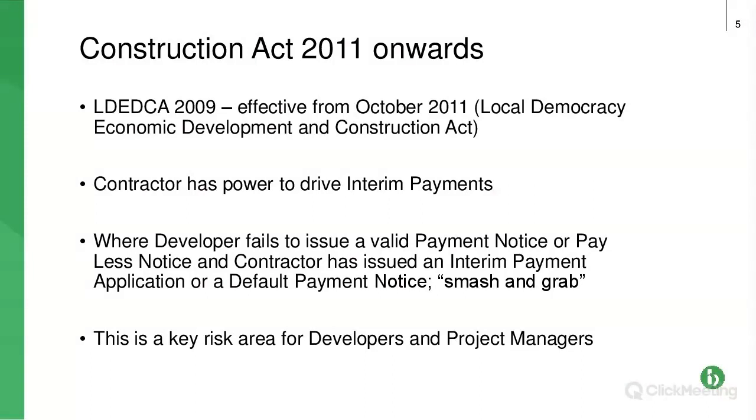We'd had adjudication, we'd had interim payments, all those things that we know about from the Construction Act for over 10 years. And as often happens, the legislation was reviewed and changes were made. A big change that was made was the status of payment notices, pay less notices, etc., which meant that a smash and grab adjudication was possible. Now, from your perspective, contractors, subcontractors, this is a real opportunity for you. As it says in that final bullet point, it's a real risk area for the paying party in a contract, so developers, and the project manager under an NEC, because of course they're responsible for issuing the payment notices. Just beware, contractors in the room, because of course it's a risk for you with regard to your subcontractors.